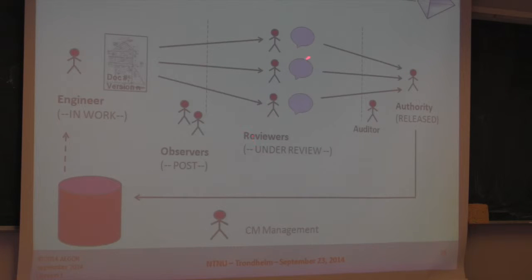But if they don't approve, then the document goes back to him, and the state goes back from under review into in work. And that's different with the thing now. If you have draft and final, it doesn't fit you anywhere. It's just a funny thing.